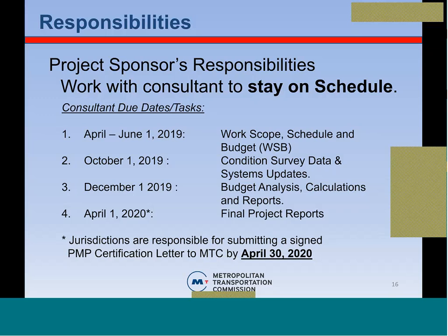But between April and June 1st of 2019, that's when the work scope, schedule, and budget are due. The reason that it's due around April is MTC makes the selections in January. That's when I'll take all of the projects that were selected, and those recommended projects will be approved by the MTC Administration Committee, and then I will give all of those names over to my consultants. But it takes until about April or May for them to start working with you, because I have to